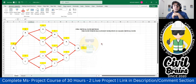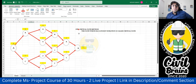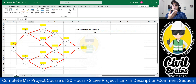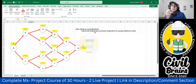Hello civil engineers, welcome back to the lecture. In this lecture onwards we'll see what is CPM — that is the Critical Path Method — and how to solve examples manually, then validate with software. CPM stands for Critical Path Method. The path which has the longest duration from start to completion of a project is called the critical path, and that method is called the Critical Path Method.